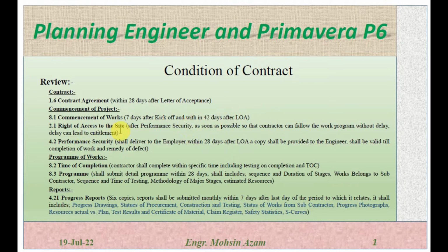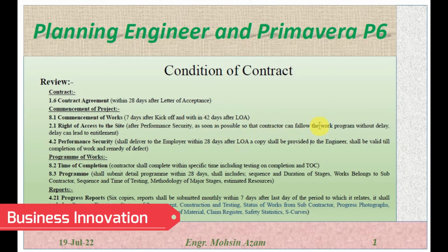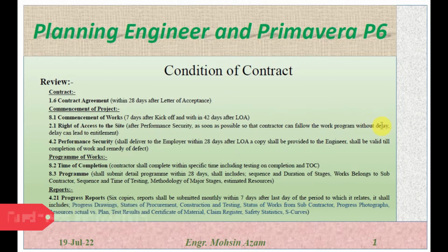Right of access to the site, 2.1. After the contractor submits the performance security, access should be given as soon as possible so that the contractor can follow the work program without delay, because if the delay comes from the project side, it can lead to entitlement for time or the cost of the delay.